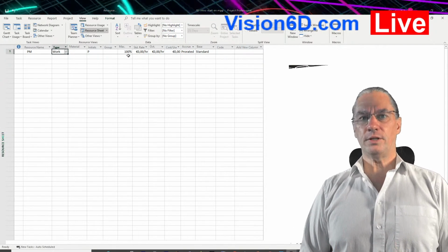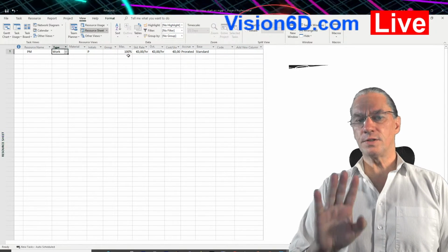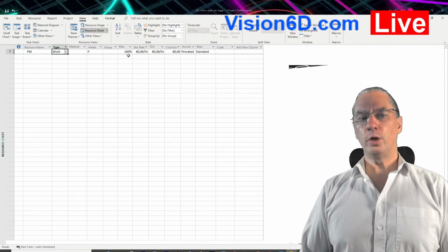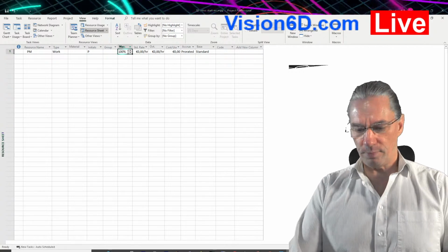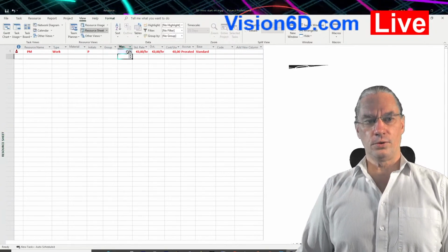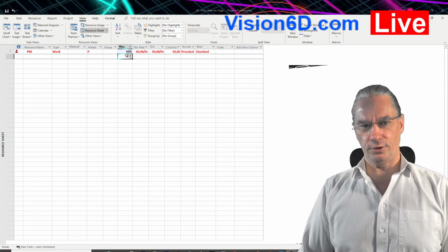It could be that you say, in our case, our PMs have at least 2 projects. So on this project, the PM will be allocated for a maximum of 50%. So this is something that you have to define here.